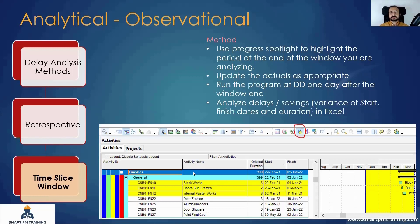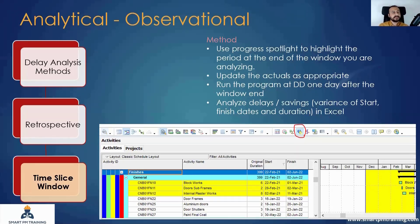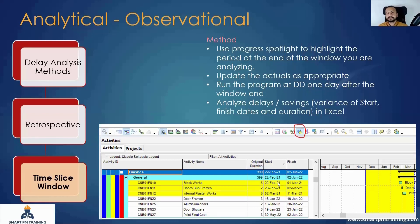After you do this exercise, you run the program one day after the window end. If you run it on 31st of March, Primavera understands the data date as 7 or 8 a.m. that morning, so you're actually forecasting work for 31st of March itself. You can see many activities scheduled at 31st of March because the day is not over yet. To go around this, you schedule the program one day after the window end date — which is 1st of April.